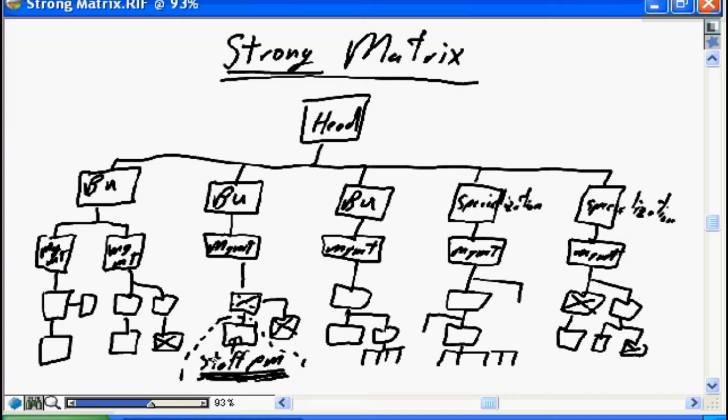project manager, where this staff project manager has the time, has the skills, has the attention, has the focus, and will be working on nothing but project delivery, where in the weak matrix, the line manager had both project delivery responsibilities as well as line delivery responsibilities.